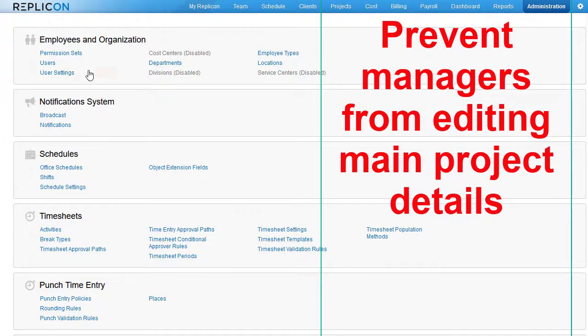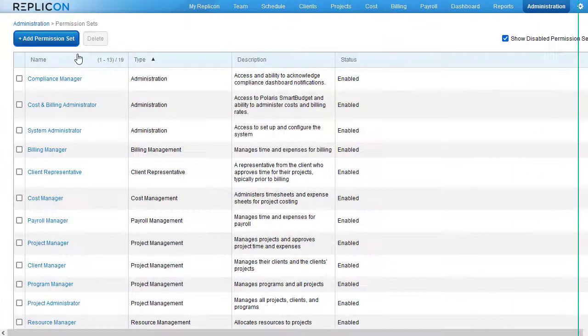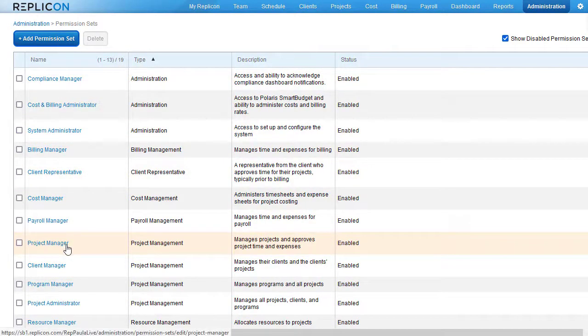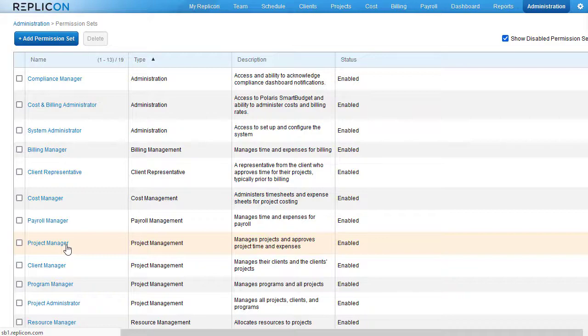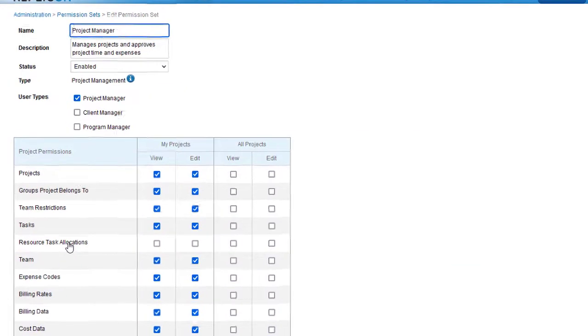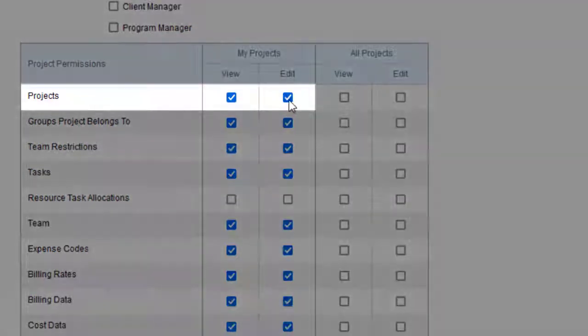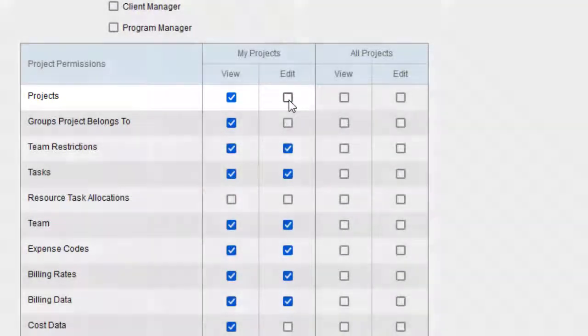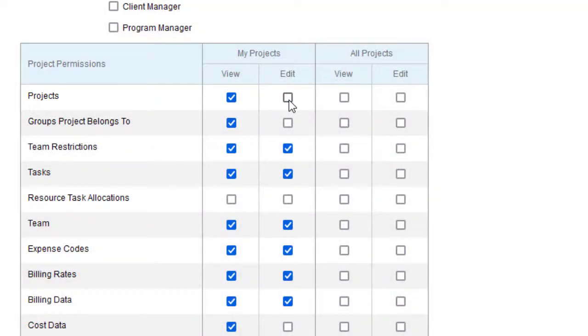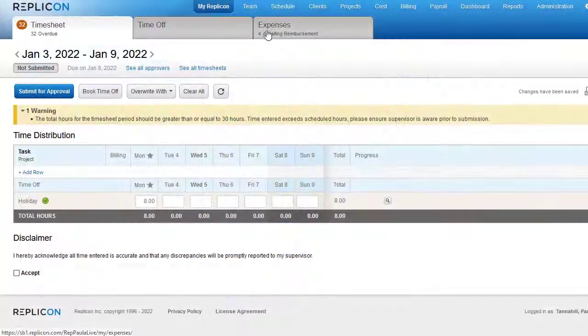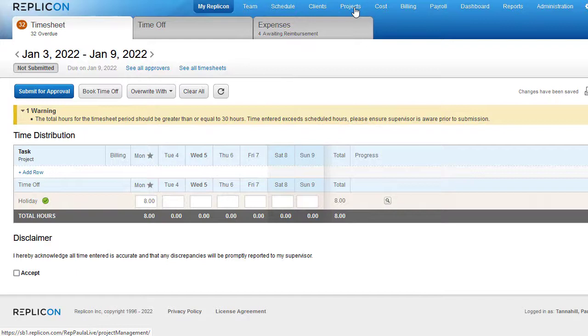Replicon now lets you prevent project managers from adding projects or editing basic project details, while still allowing them to edit certain elements of projects, like team assignments, tasks, and billing rates. If you disable Edit Projects permission for a project manager, they will no longer be able to add a new project, copy a project, delete or disable a project, or edit details on the Project Info page.